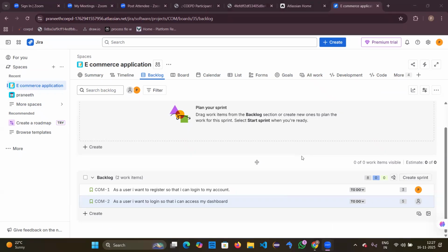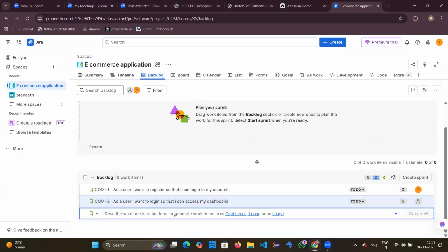So like I said to you, with the help of this BV and CP, a prioritization will be done among all the user stories. For a project, there will be some important features that need to be developed, right? So based on these BV and CP values, prioritization will be done. While you are in the sprint, if a story is higher prioritized, then it will be developed first, then they will go to the lower prioritized ones. Okay. So in this way, story points help in prioritization. Before itself, it will indicate how much time should be taken for this particular story to be developed, and all those things can be analyzed.